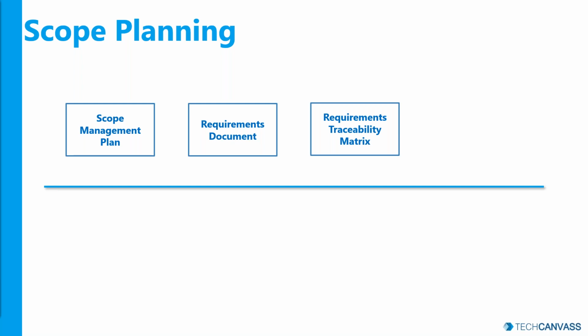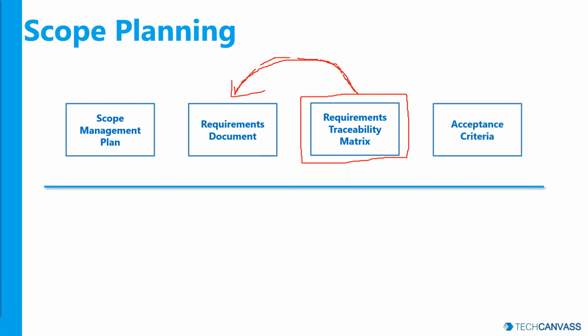But there must be a connection between your deliverable and your requirement. There must be a link so you can trace back all the way, and that's important as a part of your planning, right? Trace your requirements all the way till they are delivered into the customer's hands. More importantly, you need to define the acceptance criteria much before, probably during the planning of your project.